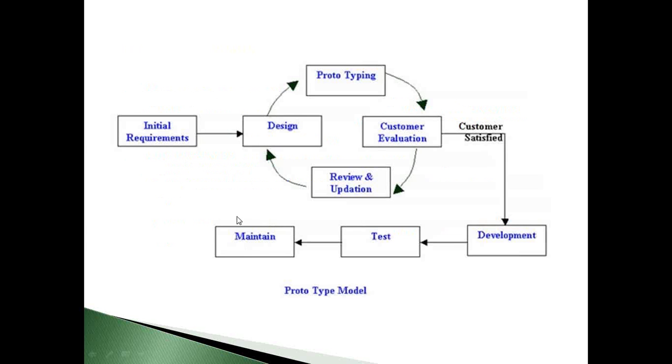In this process, the first stage is that we have the initial requirements, and we design the requirements. After designing, we develop a prototype and forward it to the customer. The customer evaluates the prototype, reviews it and updates his comments.